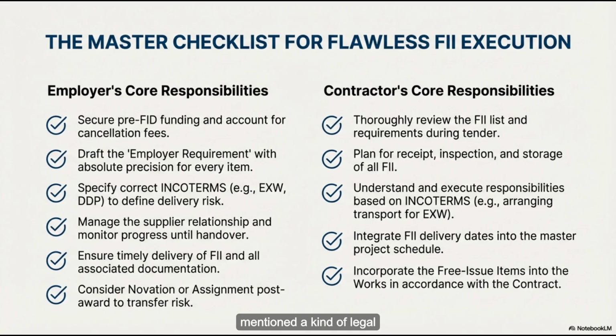The source mentioned a kind of legal magic trick called novation. Novation. It's a brilliant legal escape hatch. How does it work? It's a way to transfer a contract. So the employer does the hard work. They find the supplier. They negotiate the price. They place the order pre-FID. They take all that early risk. They get the ball rolling.